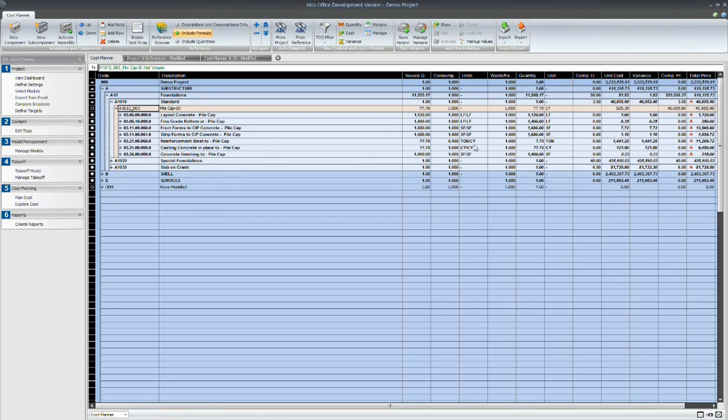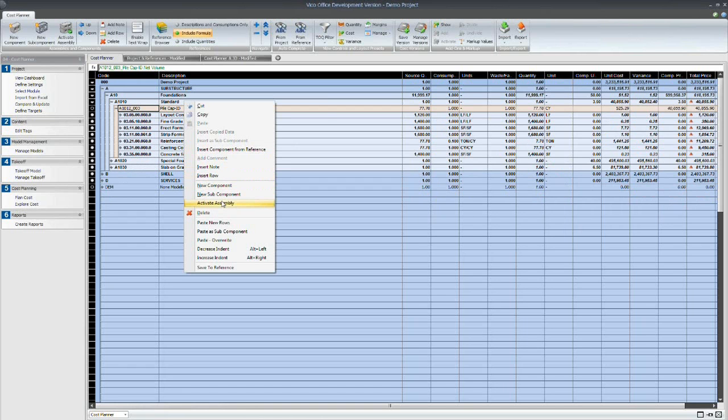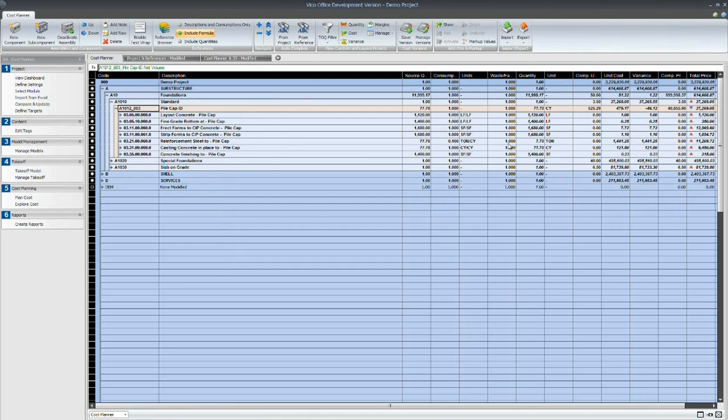And once we're happy that the scope of this part equals what we had allowed in that 525, we're happy that it's apples for apples, we then activate level of data. And you'll see here, this is the comparative unit.